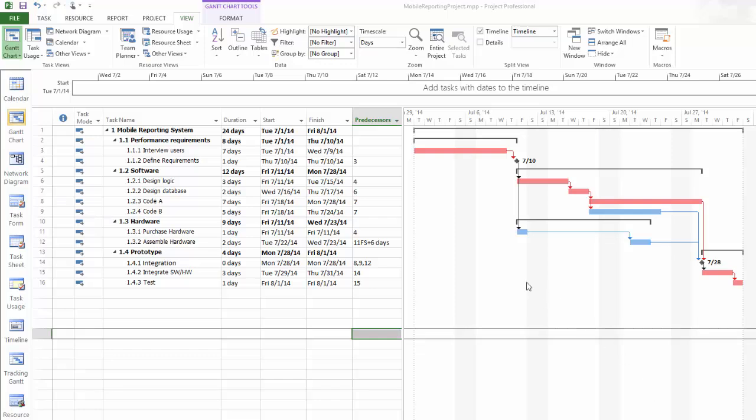To answer these questions, you have to find how many critical paths you have in this project. In this example, you can see that we have only one critical path. That means this project is relatively not sensitive. The other information you need to assess is the slack of those non-critical activities. The more slack those activities have, the less sensitive your project is.